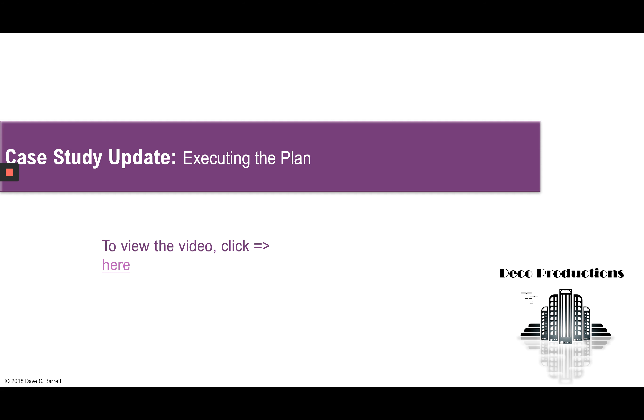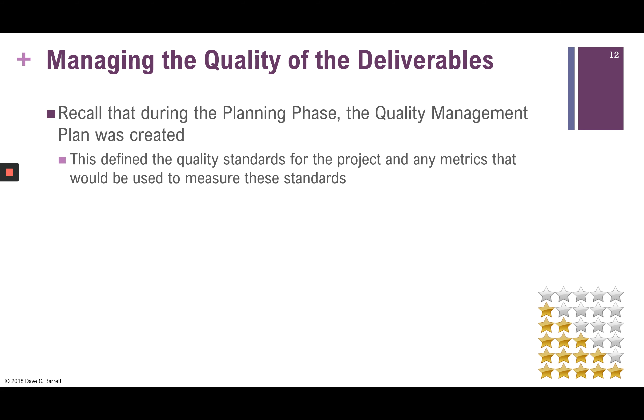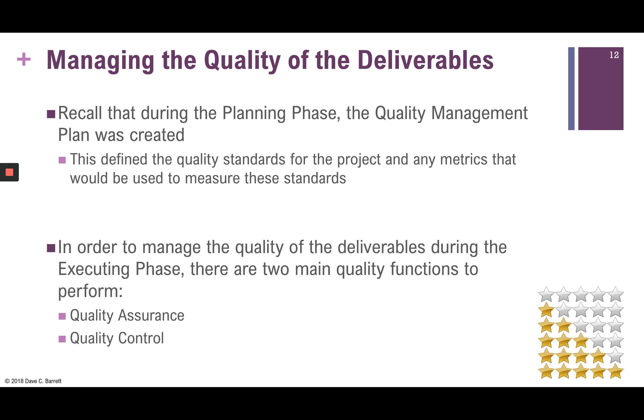Please refer to your textbook and read the case study update called 'Executing the Plan' in the appropriate chapter. Moving on to managing the quality of deliverables — this is a key item within this chapter. During planning, the quality management plan was created, defining quality standards and metrics. During the executing phase, there are two main quality functions: quality assurance and quality control.